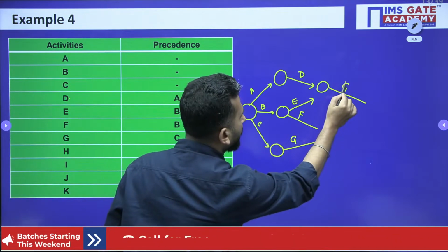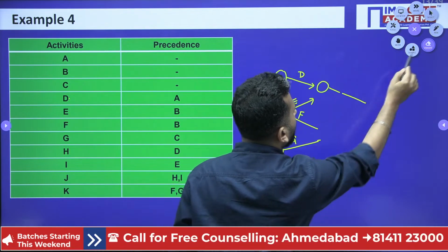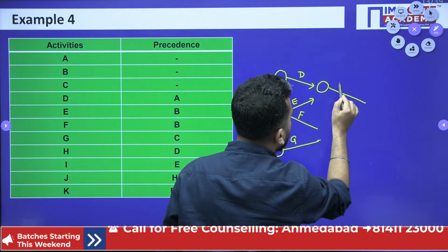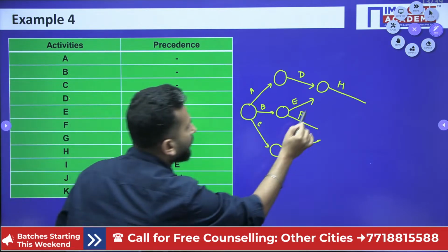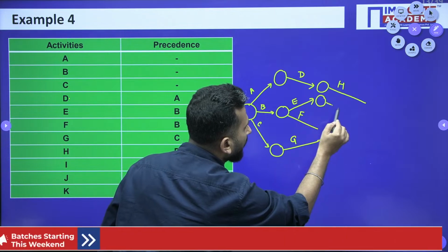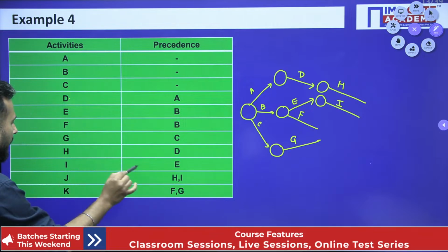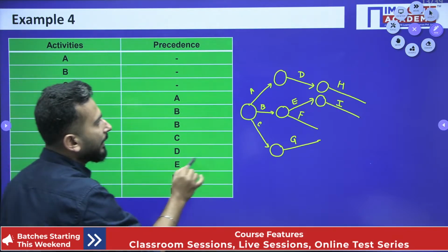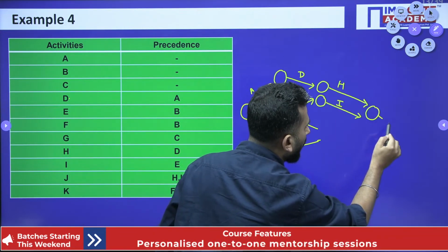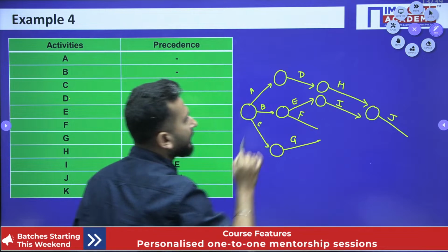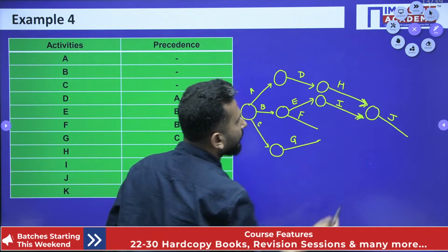Sorry, this is H. Just a minute. This is your H. Fine. I has a precedence of E. So let me end this and let me start I. Done. J has precedence of H and I. They need to end somewhere, and then I have to draw J. Why? Because H and I are going somewhere over here and merging. I hope you are getting it.